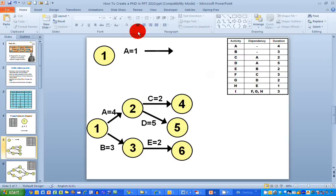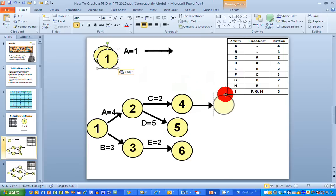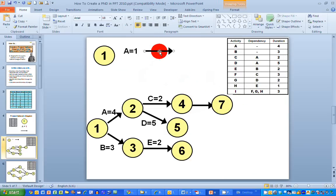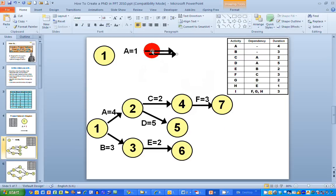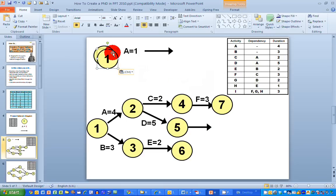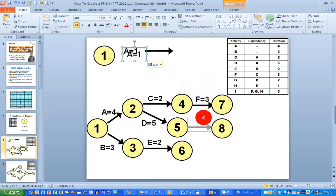Activity F is dependent on C being complete. I put in the arrow for activity F with end node seven, and the label F equals three days. I do the same for activity G — an arrow with end node eight, and G equals two days. If you're reasonably experienced in project network diagrams, you'll know I'm not making an error here — I'm doing this on purpose to show how these things work.